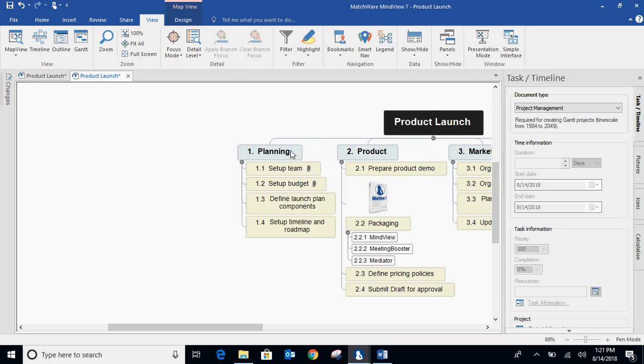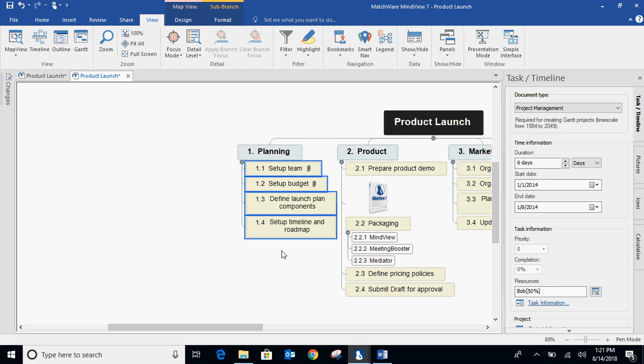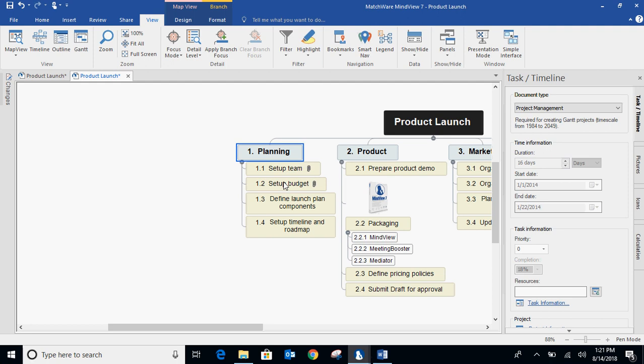The other thing that we do is we turn these deliverables into summary tasks. So as you start doing estimations on the lower branches or work packages, everything rolls up to the parent. So I'll give you an example. You can adjust the durations, the start-end dates. There's a whole resource management side of the software, but basically at the end of the day, we're just doing some estimates on these work packages.